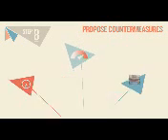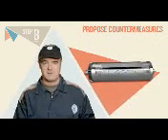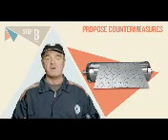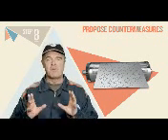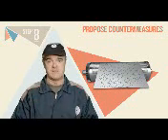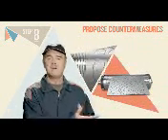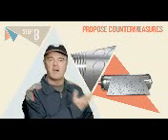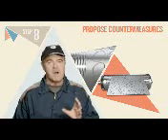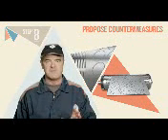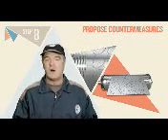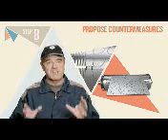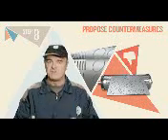This was the situation in the printing plate case. Plates were being discarded, even though they were still okay to reuse. Operators were judging subjectively when a plate could be thrown away just from looking at it. And here's an example of a countermeasure proposed by their Kaizen team. To put RFID tags on each plate and sleeve to track how many kilometers of paperboard had been printed from each one. Why? Because that would give the operators an objective fact upon which to base their decision to scrap or reuse plates.